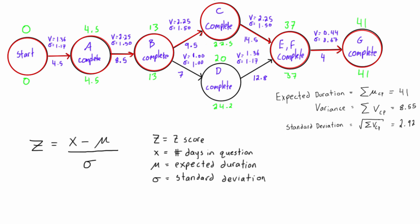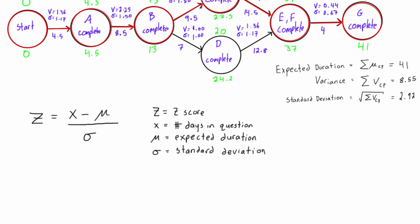In this case we're given the percentage. The problem is estimate the completion date with at least a 95% confidence level. So we already know that the probability of whatever z-score it is—we don't know what the z-score is yet—but we know that the probability will be 0.95, giving us our 95% confidence level.